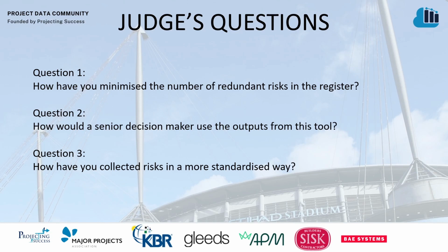Collecting risk in a standardised way: the introduction of the entry form with these drop-downs ensures that the risk descriptions, all these free text fields that are currently in use in most risk management processes, are reduced down to something more standardised, and it also removes human error such as mistypes or misspellings. But also, the use of something like a Microsoft form, for example, that we've used for this, or something bespoke developed for it, means we're able to apply that standard approach to collection in various formats, whether that's on a handheld device at the moment the risk is identified, on a tablet at a construction site, or actually sat in a risk workshop at a laptop or computer.